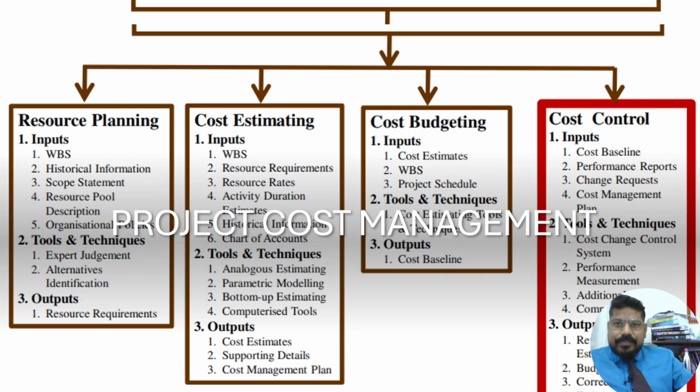You get an idea. So, for example, if person A, who is a project manager, is working on a SAP implementation project, a similar kind of SAP implementation project has happened within the organization a couple of years back. So taking the data and information from that old project to utilize in the new one is known as analogous estimation. Parametric estimation modeling means parameter based.